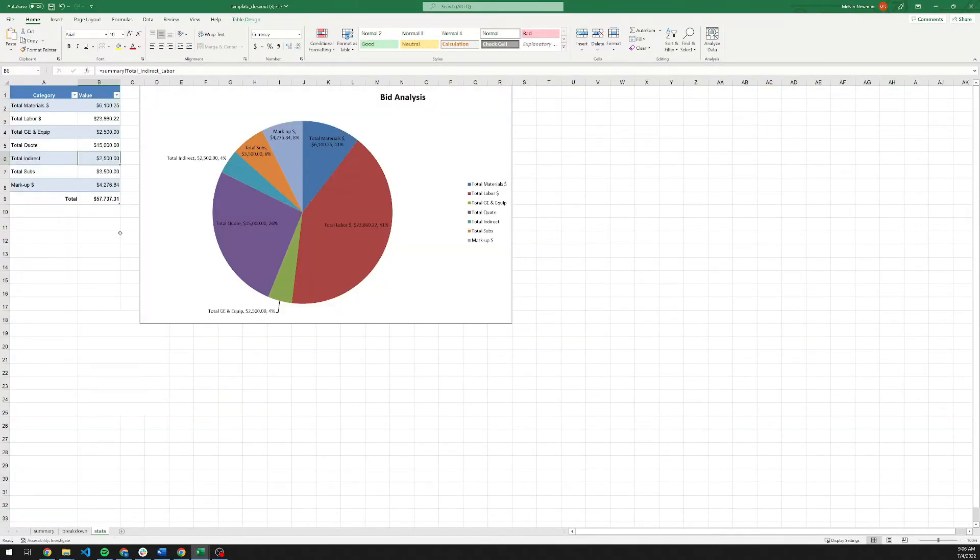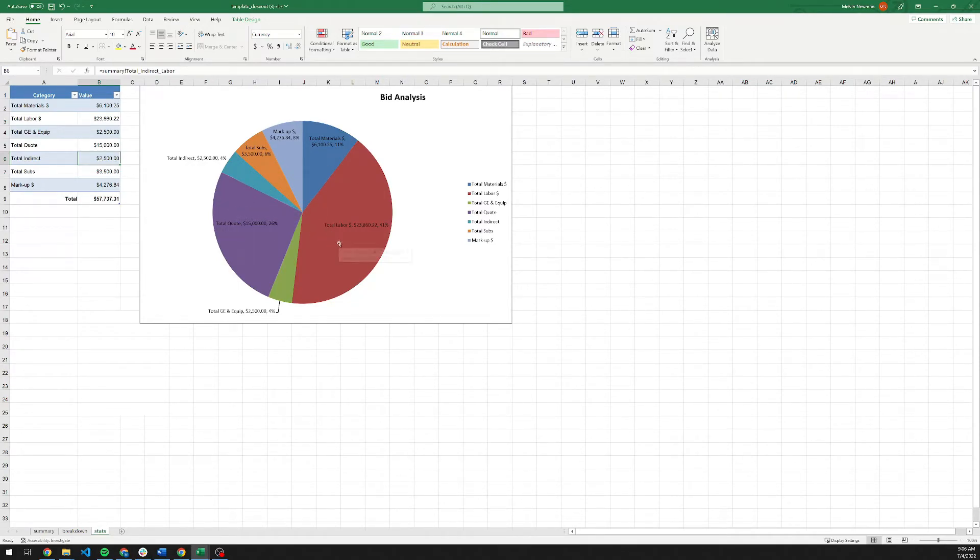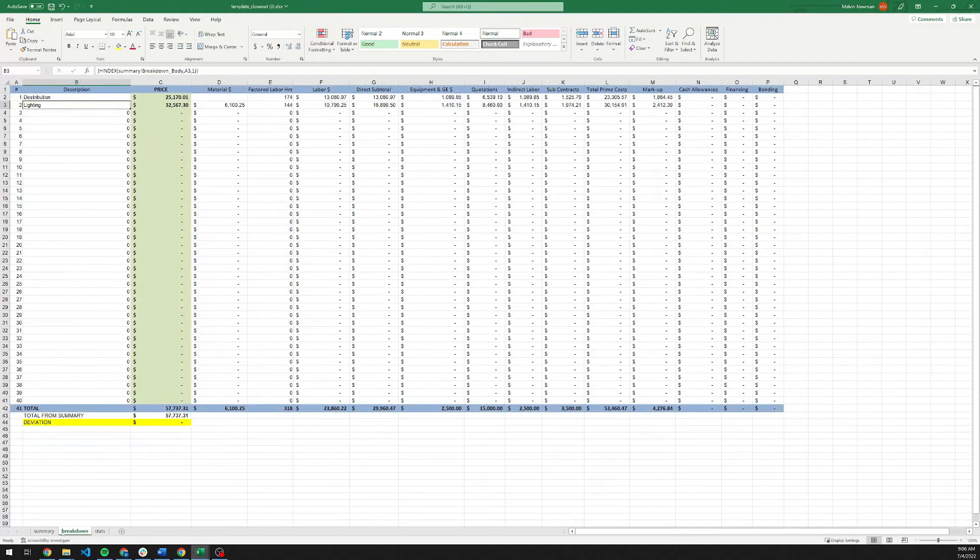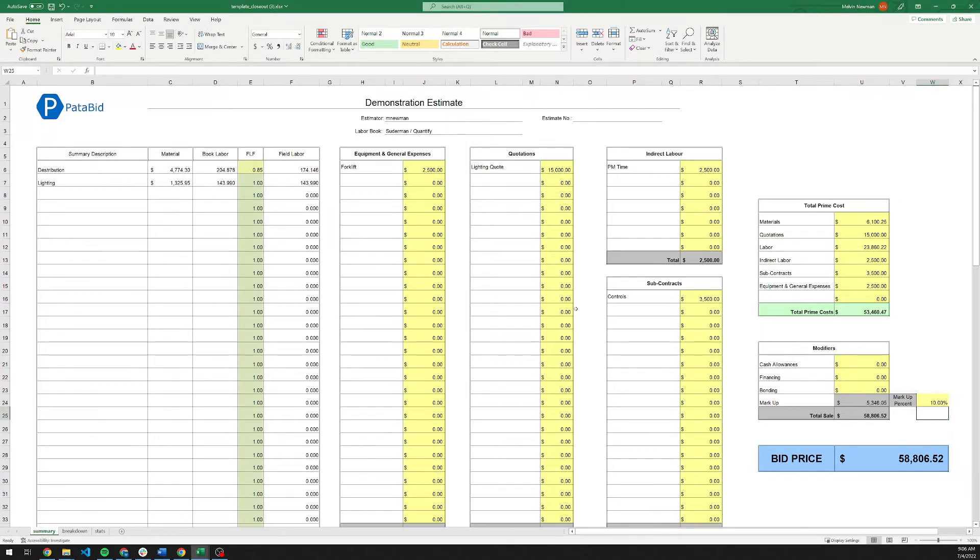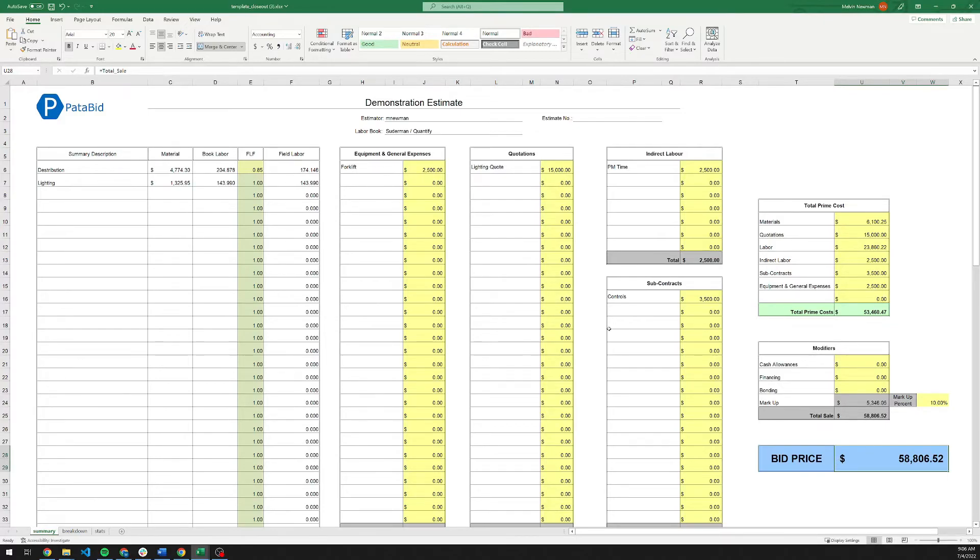On the stats page, there is just a simple breakdown of how the project is working out. This project is predominantly a labor project. So it's a little bit of a higher risk project. Going back to the front end here, I may want to make this a 10% markup on it. This then becomes your total bid price for the project. You can save this document as your record of bid for it.